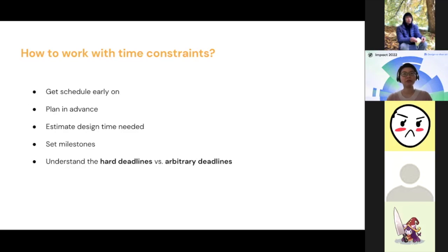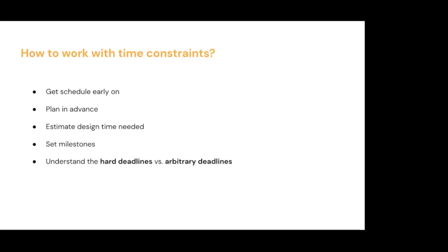Think about the roadmap. If it is going to launch in 4 weeks, and engineering needs 2 weeks to build it, that means you have 2 weeks. Within those 2 weeks, you might need to do some research to understand the scope, and you might need to talk to users. You might need to talk to your manager. You might need to talk to your team to brainstorm.